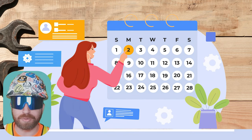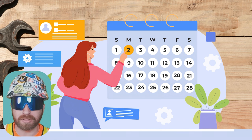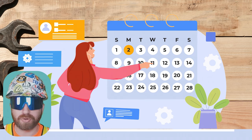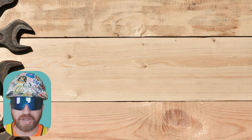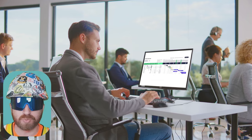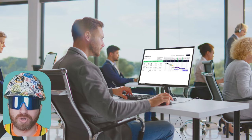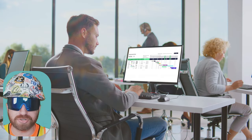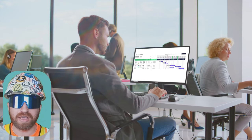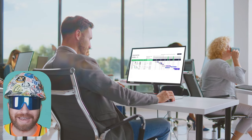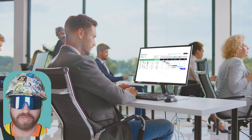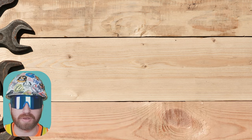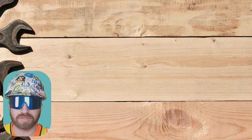A project schedule is a living, breathing document that needs regular attention and regular updating to ensure the project is still on track. The critical path can change throughout the duration of a project based on real-time schedule updates. This schedule is comprised of a start date, a series of activities, potentially some milestone dates, and a finish date. An individual activity is any defined scope of work with a set duration — meaning you have a task and an associated time with it.